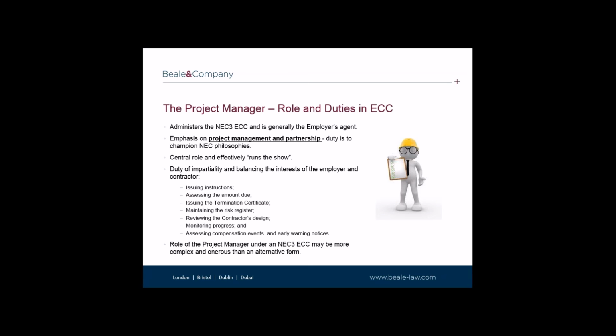The project manager must act impartially and balance the interests of the employer with the interests of the contractor. The main duties of the project manager are set out on the slide, which include issuing instructions, assessing the amount due, issuing the termination certificate, maintaining the risk register, reviewing the contractor's design, monitoring progress, and as we've said, assessing compensation events and early warning notices. These duties are extensive and potentially quite onerous.